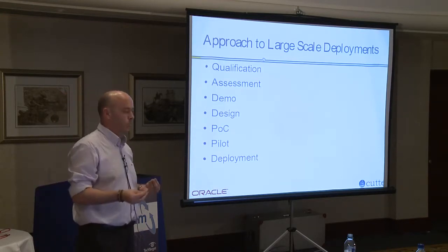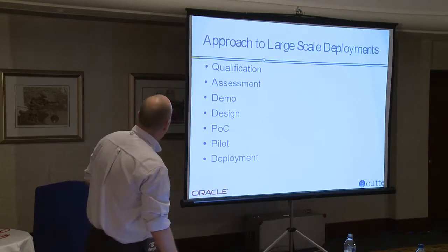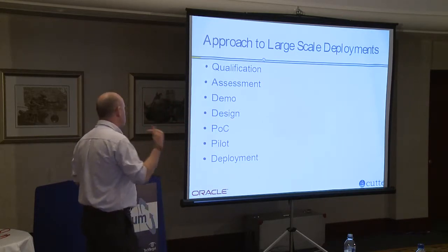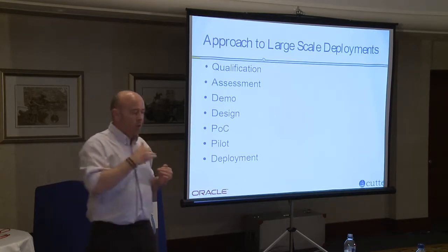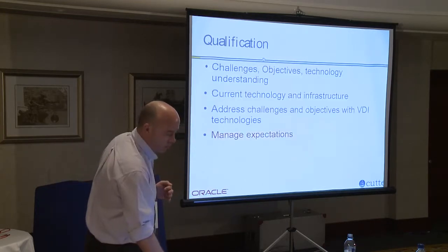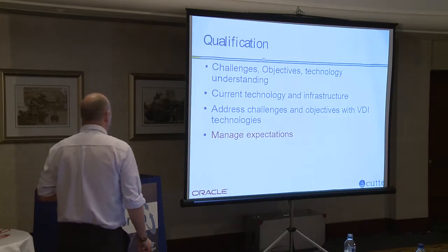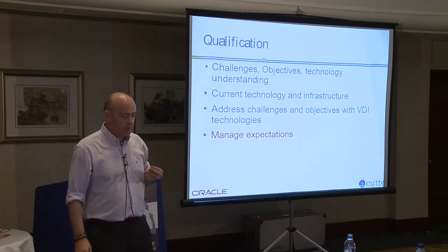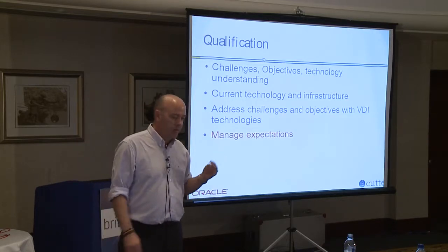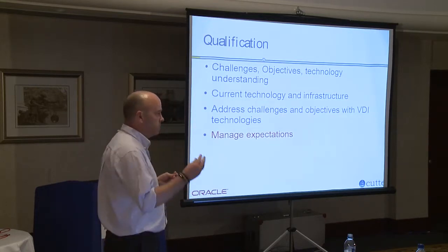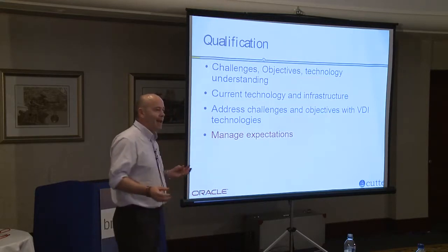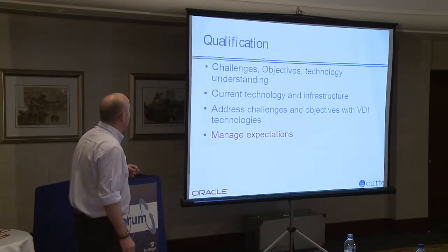We'll look at the whole process of going through this: qualification, assessment, demo, design, POC, pilot, deployment. This is something that we've stuck to throughout all of our processes now, and we found it to be very successful. Some of our competitors in the market, solution providers, are skipping out certain bits of this process, and as I say, we've spent time going around clearing up after them.